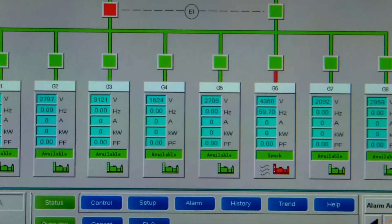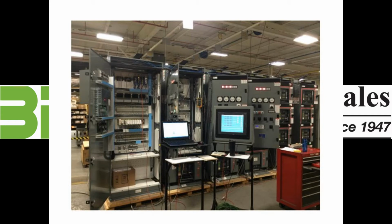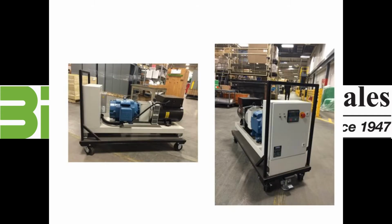It is recommended that a factory witness test be done at the paralleling switchgear factory. Ideally, the generator switchgear factory will have the paralleling breakers for testing, as well as control panels representing the generator controllers. Also, transfer switches and remote enunciators are there to complete the system testing. Preferably, have motor generator sets there, and not just utility 1 and another utility saying it represents the generator. Have actual dynamic engine generator sets to show how the system will react.